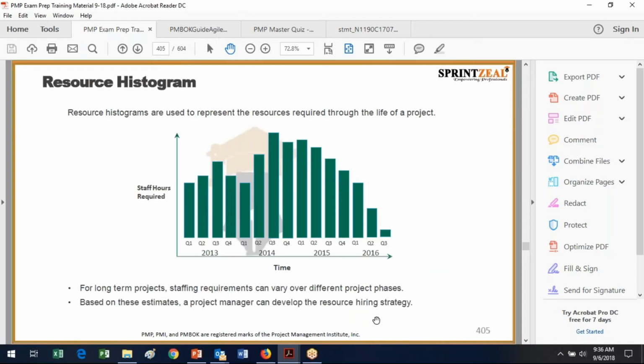And of course, this is one of the things that Microsoft Project will give you kind of for free. I mean, not for free, but if you load a schedule with all of the resources and things, it'll tell you what the staff hours required for the various things are. And you can see by type whether you have too many or too few. So maybe if your staffing line is like this, this is really the staff that you have. Say, this might be 10 staff members.